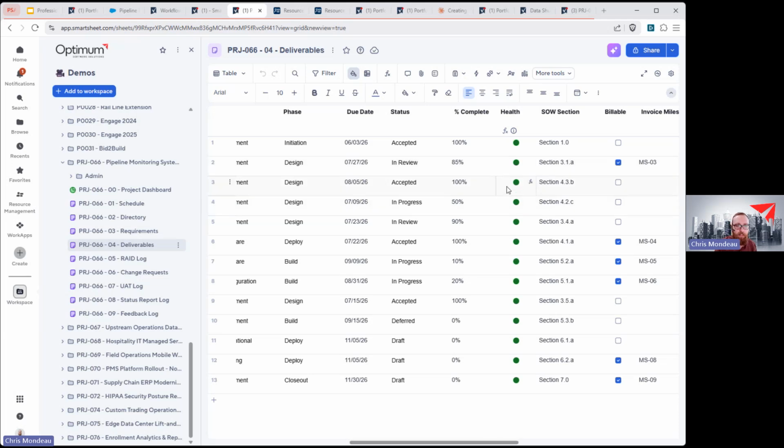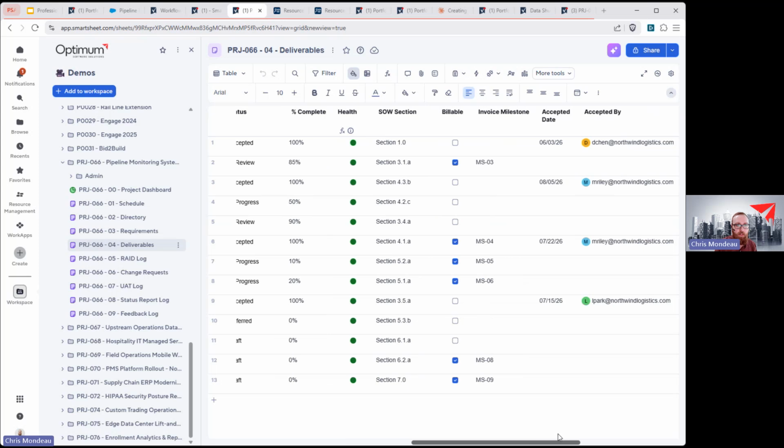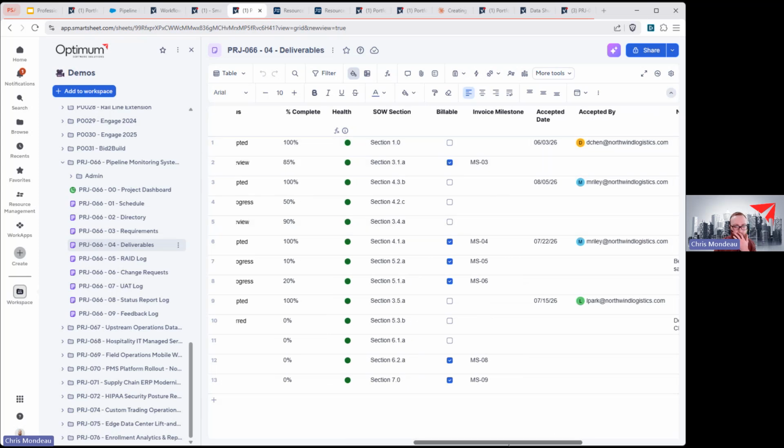Same thing if I'm referencing health as well. We'll also talk about how this can bubble up to the invoicing. So as you're maintaining the deliverables and your schedules over time, as soon as you hit percent complete, what's the next break in the chain of communication for PS orgs? It's telling finance to go invoice the customer for this. With something like this, we can monitor that progress, trigger to an invoice log, and then that can send to the finance team, whether they're generating an invoice or contract update from a change order in Smartsheet, or pushing that information into their financial system of record. Maybe it's QuickBooks, at least to actually process the formal invoice.